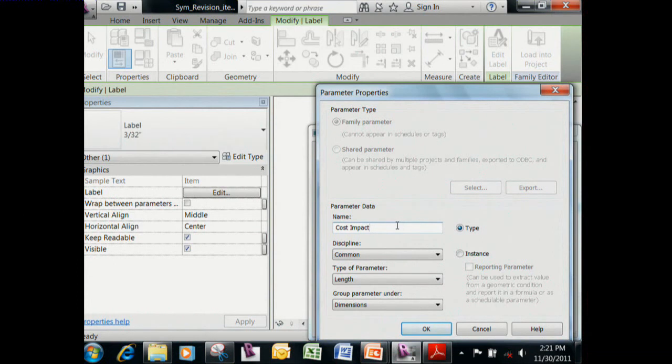And that would be valuable if you anticipate that the contractor you're working with is going to be creating a change order for everything you do, or maybe the owner you're working with wants to review every single change. And if you can assess, I don't think there's going to be a cost impact to this, then you can group all those changes that you've made into, here are all the ones that should have no cost impact, and we can kind of discuss those and put those off to the side.